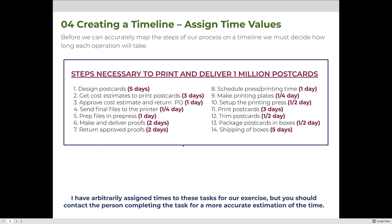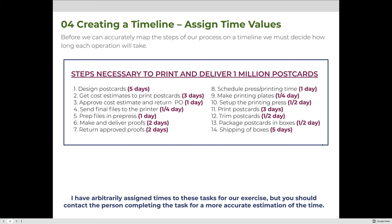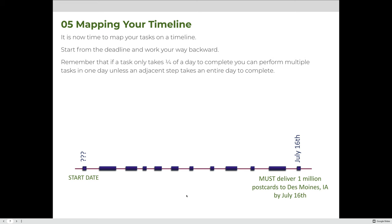Now that we know how much time each step will take, we're going to map it out on a timeline. We have a start date we don't know yet and an end date — the date our project needs to be done. We'll place a hypothetical start date at the beginning and the delivery date of July 16th at the end, then work backwards. Starting with step 14, we'll map out how long each step takes — step 14 is five days of shipping leading up to delivery.